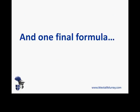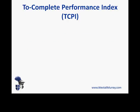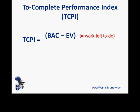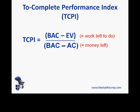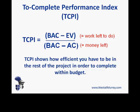One final formula we need to know is the to complete performance index. The TCPI takes budget at complete minus earned value — the work we've got left to do — and divides that by budget at complete minus actual costs — the money we've got left. What this shows you is how efficient you have to be for the rest of the project in order to complete within budget.